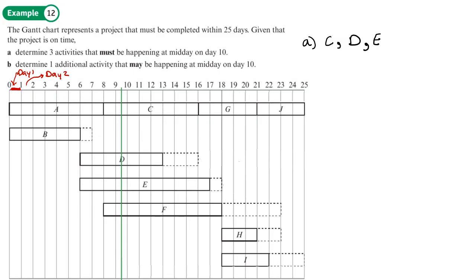Then if we look at activity F, now what happens to activity F? Now if I move this all the way across, F is 10 days long. So if it moved across to the very latest time that it can finish, I think this is 10 here. Or any time after this day, as it starts on, it doesn't have to be happening on day 10. So actually F may be happening at midday on day 10, but it doesn't have to happen. It can be delayed beyond the midday of day 10. And H and I, well, then they're nowhere close. So actually it's C, D and E.